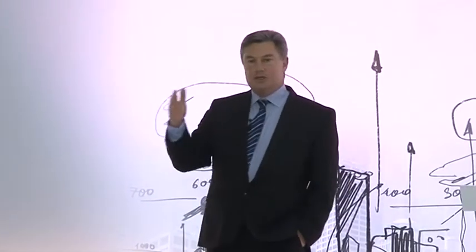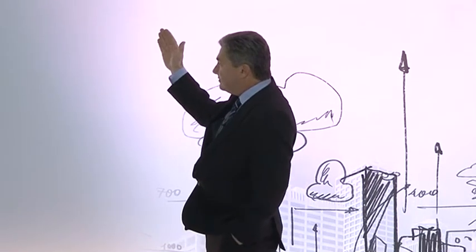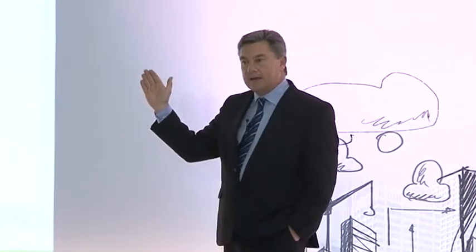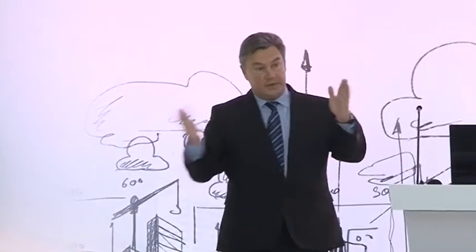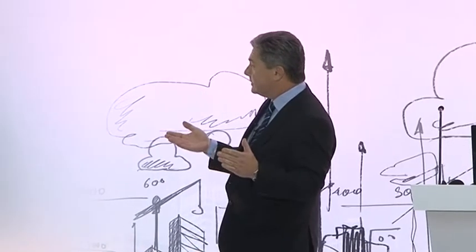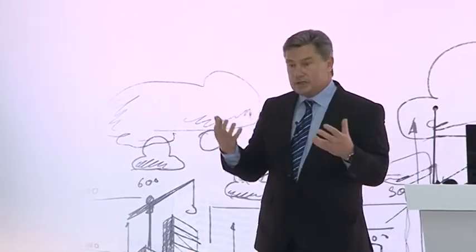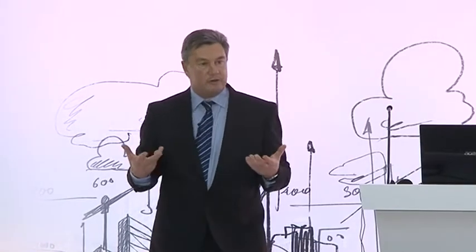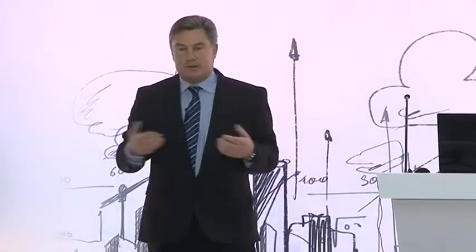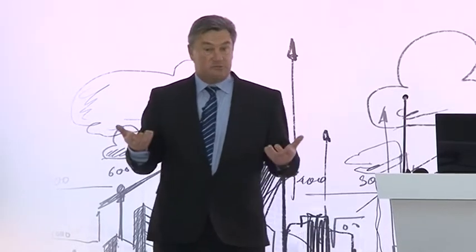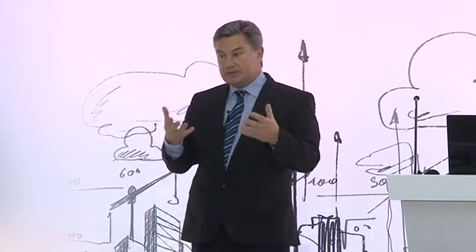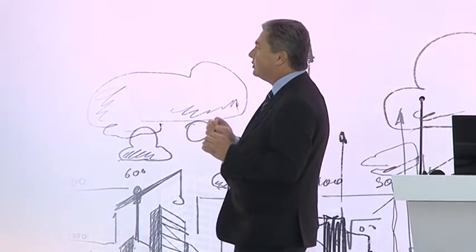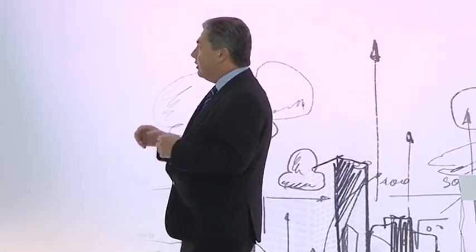Why people really like S-curves is they graphically show us where we're likely to finish and how close that target line is to the baseline. Yep, so the closer it is, the better it is, but if there's a big difference, we know that we've got some problems. So we can immediately see here, a manager who doesn't understand project management software. If you think of a schedule with 20, 30,000 activities, which isn't rare, it's very difficult to see where you're at and where you're going. So the idea of this is to just give a very quick graphical but accurate view of where we are.